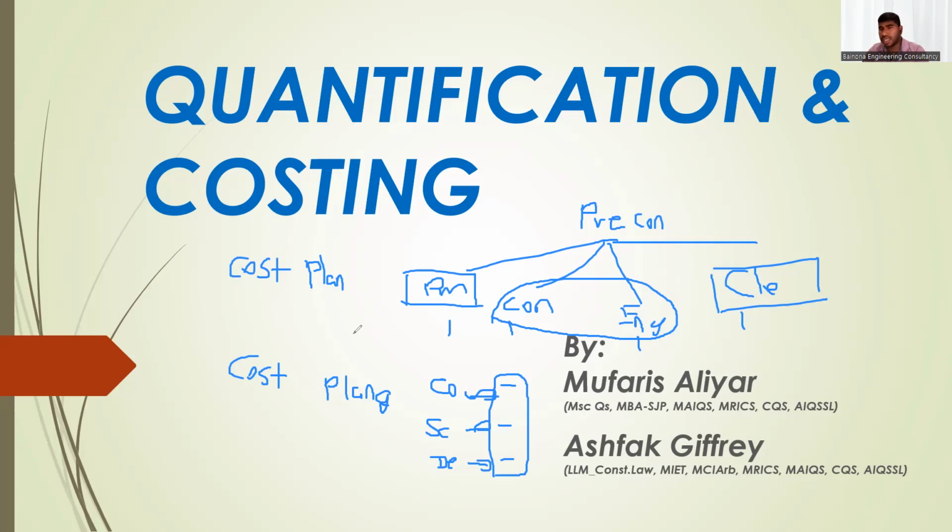Maybe this procurement department issues an LPO or LOA to a block work company. You know that block work is done by a small company. You supply the block and they come and bring 2 or 3 masons, and they build the block. So when you're awarding the LPO or LOA to these companies, that is also a kind of procurement. These are all procurement: material procurement, labor procurement and subcontract procurement, all these things.